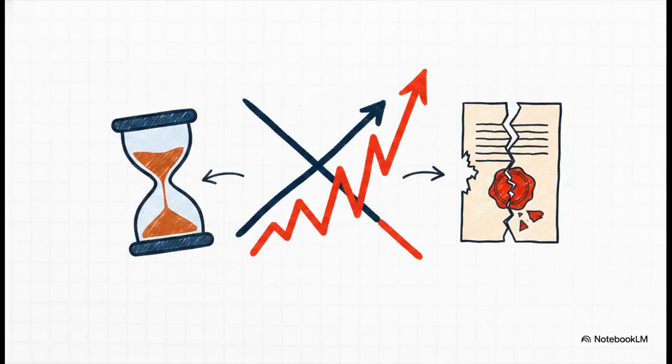And this leads us to a pretty sobering reality check. When you hold up your projections against your actuals, they need to match. If your actual cash flow is running beyond your projections, you are officially spending beyond your budget. For a site manager, missing these marks compromises the entire operation. It introduces massive time and cost risks, and take it from me, it can easily lead to non-compliance with your contract, which means a very messy legal breach. Your cash payments are your absolute lifeblood for staying operational, without having to sacrifice the quality or the scope of your build.